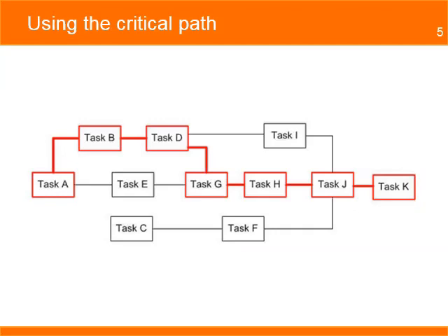By focusing on the tasks that make up the critical path, the project manager can maximize the chances of completing the project on time. If an activity in the critical path is delayed, it will delay the entire project. When a project manager is faced with delays in the schedule, an analysis of the critical path will be the first area to identify solutions to solve the delay.